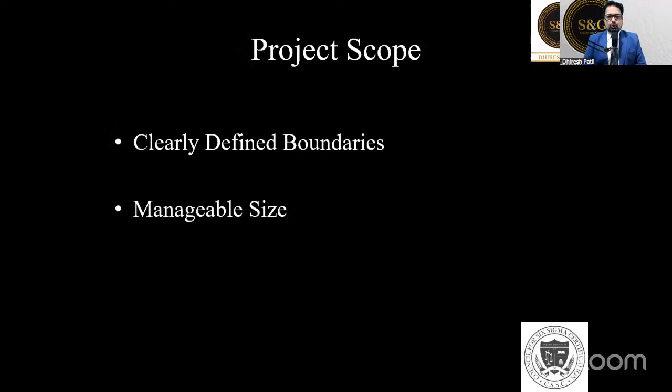Fantastic. Chalo. Let's talk about the scope. The scope should be clearly defined. As I gave you the example of HR, let's say attrition. Now understand this. Let's say your organization is a huge organization. Don't take the entire organization's attrition as a scope, because for every department, every function, the causes could be different.